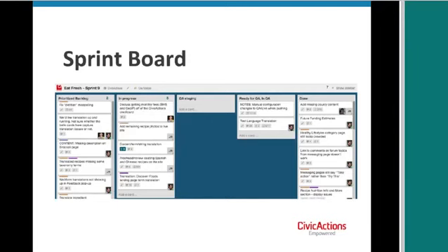Another idea that we're playing with is, for the difficult ones, they go through the UX stage before they go to development. And then for all of the tickets, instead of just a QA column, we'd split that into 2, so that it would be UX review and QA review.